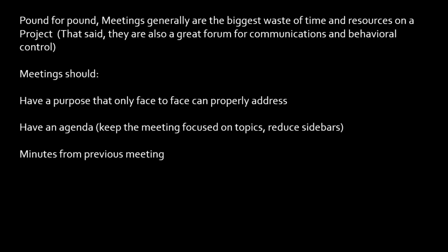Take minutes. Not me, I'm not a scribe, but somebody should take minutes of the meeting and generate a recap out to the team. This is what we talked about. Is there any misunderstanding here? Please give it to us in writing, particularly if you're in a client meeting and you decided things. You've got to send them a recap, because if you don't recap what you just agreed to, somehow, some way, it will come back at you.